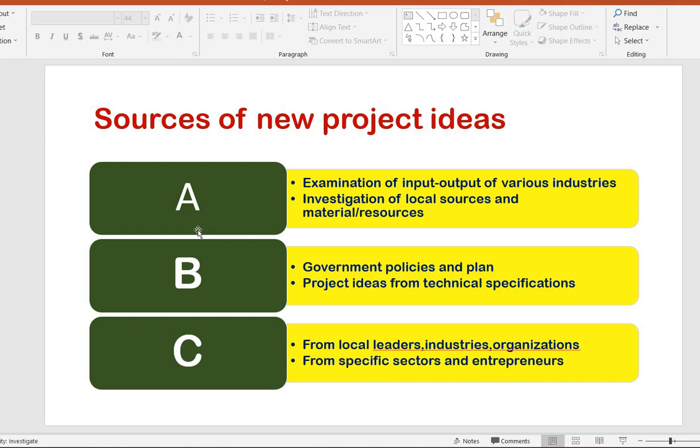The third point is government policies and plans. While deciding or initializing any project, that is also a key component, because there are some restrictions, some constraints, some priorities, some regulations. So, when we think about any building related project, there is FSI, the area, other land record related matters. So many factors are there, like water supply, or some environmental conditions and criteria, some certificates required, some licenses required.